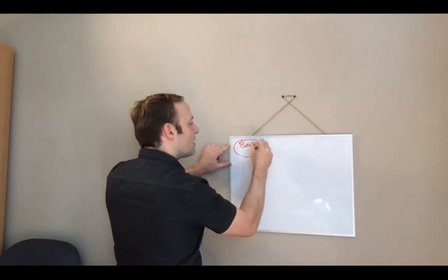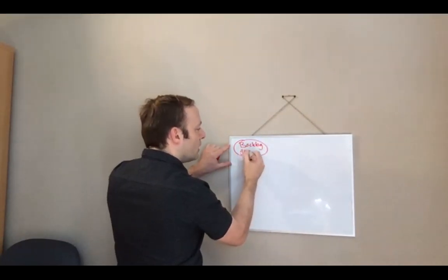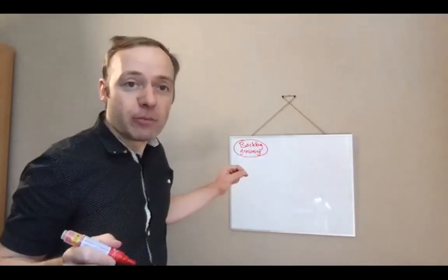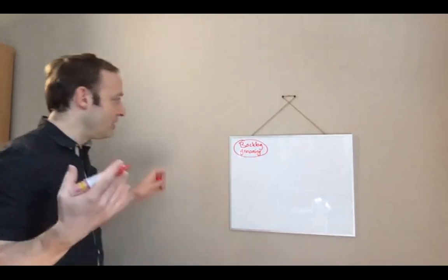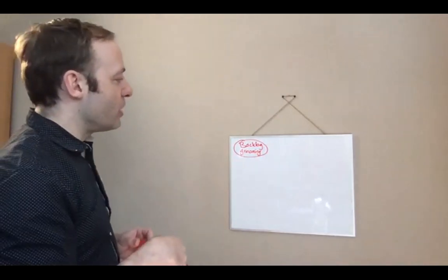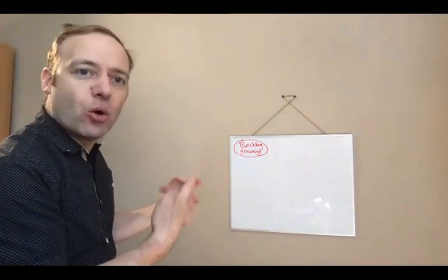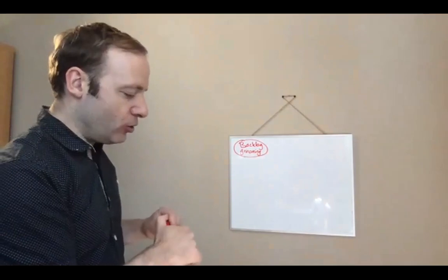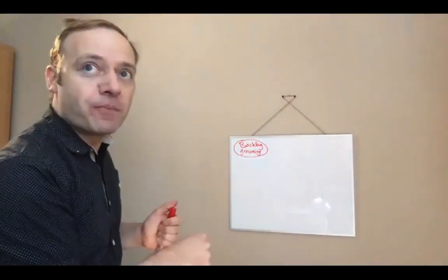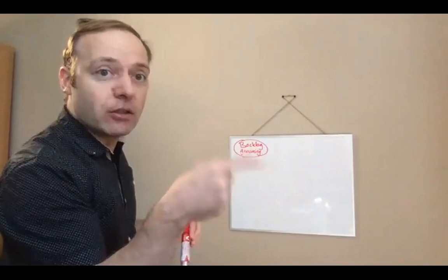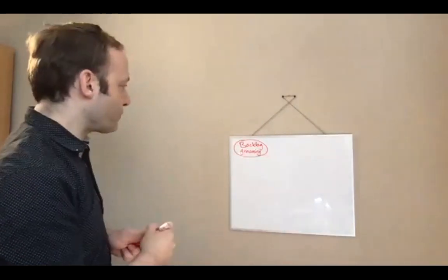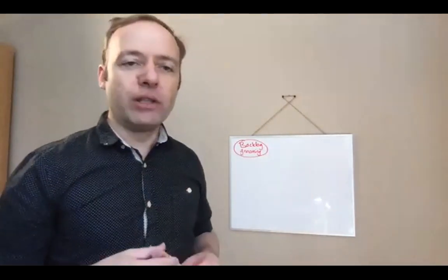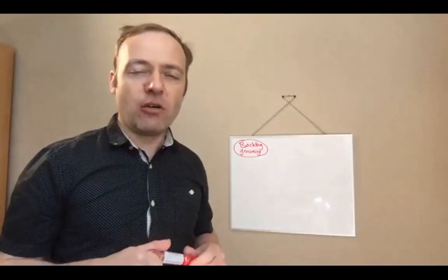Backlog inspection or grooming is the act of looking at the user stories with the software developer team, and they will discuss how they want to implement it. Maybe they need to do some research. Maybe they need to do a spike, which is a prototype, and you will create new tickets for all these things. And then once they have enough info, they will story point. They will estimate the complexity of the user story.